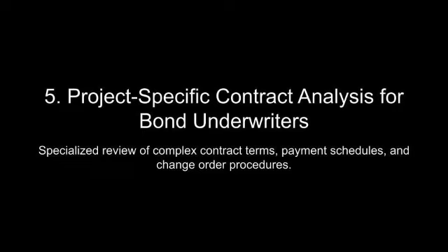The scope and enforceability of force majeure clauses depend on their precise wording, which typically enumerates the specific events that qualify as force majeure. These events may include acts of God, such as hurricanes, earthquakes, or floods, as well as human-made disruptions like strikes, wars, or regulatory changes. The clause must also establish a clear causal link between the event and the contractor's inability to perform. For instance, if a hurricane disrupts supply chains but does not directly affect the construction site, a contractor's invocation of force majeure may be contested.